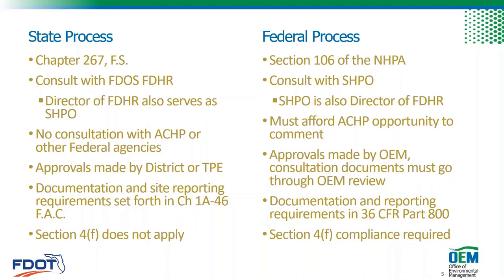The primary differences between the two review processes are: the role of the ACHP and the role of tribal governments in consultation and OEM involvement, and the specific reporting requirements for state projects set forth in Chapter 1A-46 of the Florida Administrative Code. ACHP consultation is only required for federal projects, as is tribal consultation. A project is federalized if it requires any federal approval, permit, or receives any federal funding. Even if a permit is granted for just a specific activity or location within a greater project area, the entire project must comply with Section 106. Also, federalizing a project means it must comply with Section 4(f) of the USDOT Act.